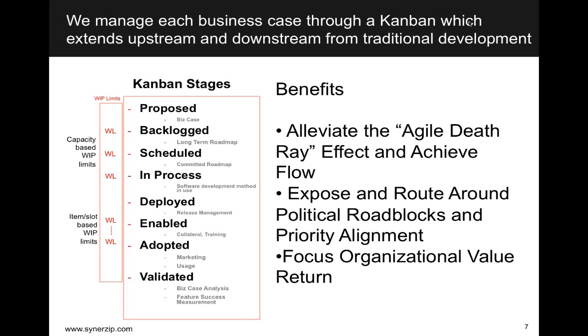Some of the best practices that you see today are things like quarterly release cycles, where you're committing to what the next 6, 8, 10 sprints are roughly going to look like, typically at the feature level. And then every sprint, or if you run a Kanban process based on your capacity limits, you pull from that committed roadmap, and that starts to get your velocity and cycle time metrics so you can accurately report to the organization where you're at.